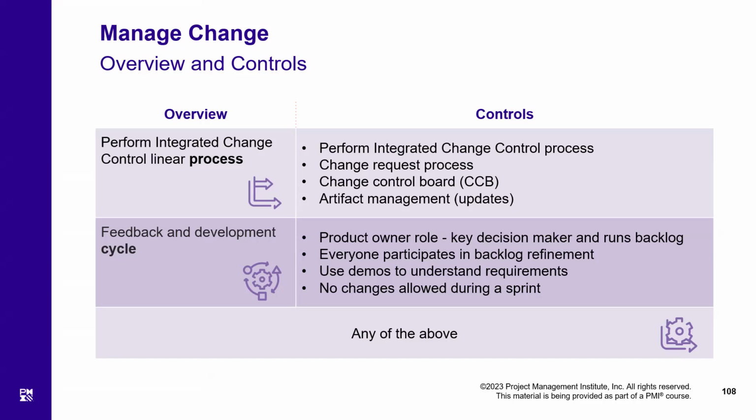Everyone participates in backlog refinement. That means, although the product backlog is the responsibility of the product owner, the whole team helps him out in refining the backlog, prioritizing the user stories in the backlog, and doing things like that. Because the product owner alone cannot handle such a volume of work. So the project team will come to their rescue whenever they're free from their iteration.